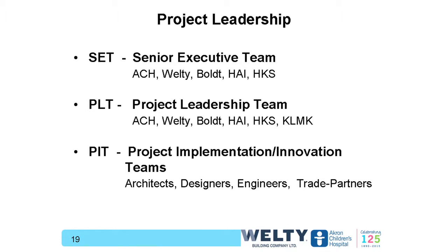The project leadership team was set up with a senior executive team. Don Taylor was a member of that team, along with Grace Wakulczyk, our COO, that you heard Sherry mention. We also had a representative from Bolt and a representative from Hasenstab. Those four individuals were basically there to help mentor the project leadership team, and in the event that the project leadership team couldn't come to resolution on issues, it would get kicked up to the senior executive team for decision.